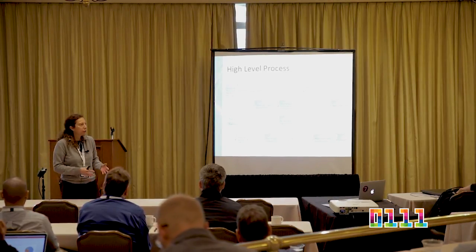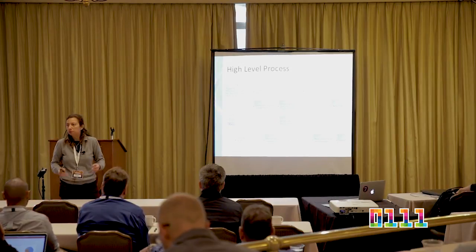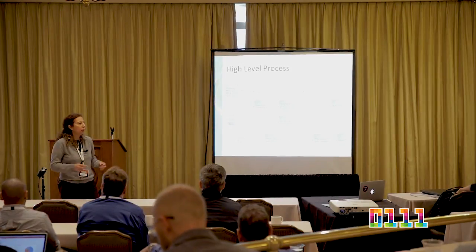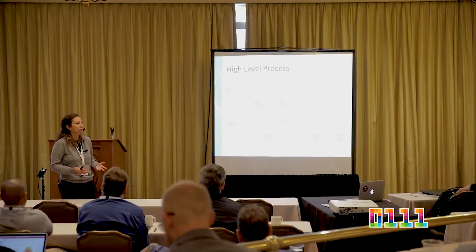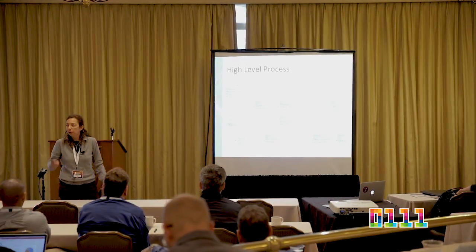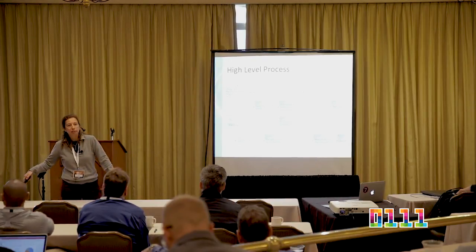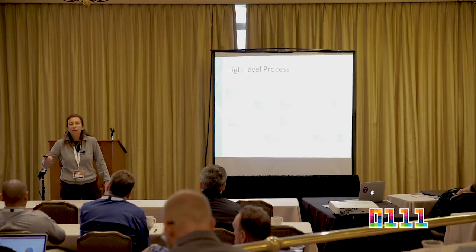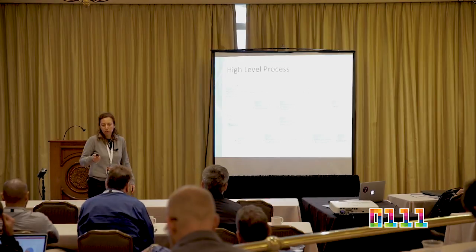And at the end of that sprint is a deliverable schematic. And working means that it was reviewed. And done means that it's signed off. And so if that's your 2-week sprint, that's the deliverable at the end of that sprint.